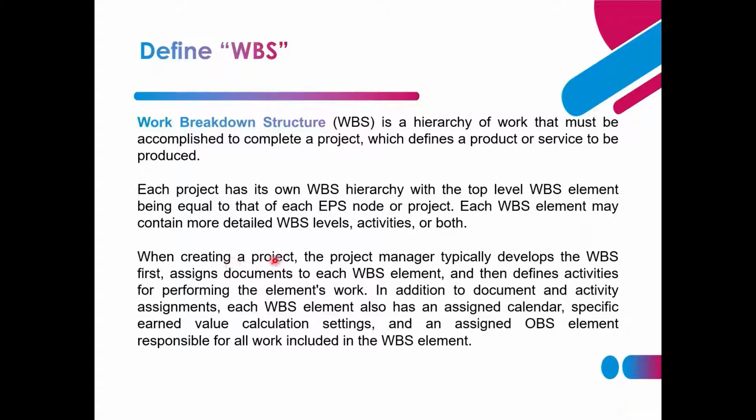So, when creating a project, a scheduler or project manager typically develops the WBS first, then assigns the documents to each WBS element, and then defines activities for performing the element's work. In addition to the documents and activities, each WBS element also has an assigned calendar, specific earned value calculation settings, and assigned OBS elements responsible for all work included in the WBS element.